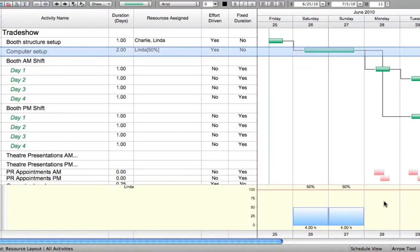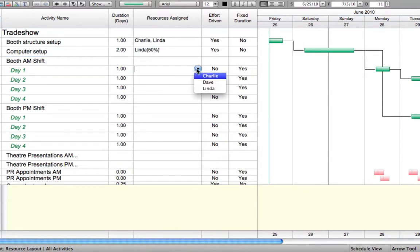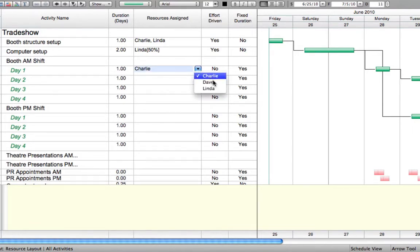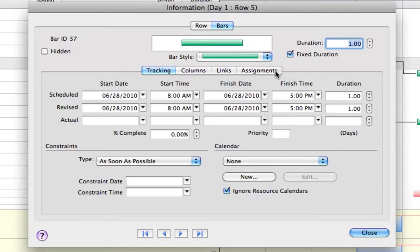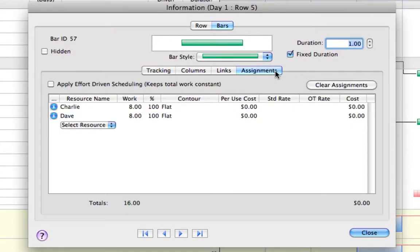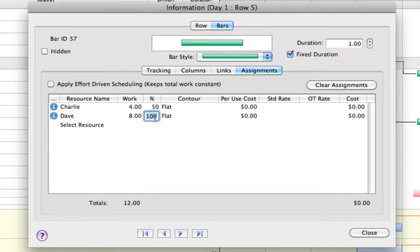For tasks with fixed durations, adding more resources will not affect the length of time needed to complete the task. Reducing the resource's effort by half does not recalculate the length of time to complete the task either. The task's duration remains constant.